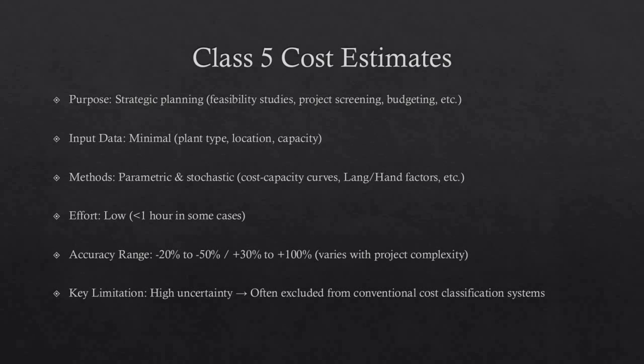Class 5 estimates virtually always use stochastic estimating methods such as cost capacity curves and factors, scale of operations factors, Lang factors, Hand factors, Chilton factors, Peters-Timmerhaus factors, Guthrie factors, and other parametric and modeling techniques.